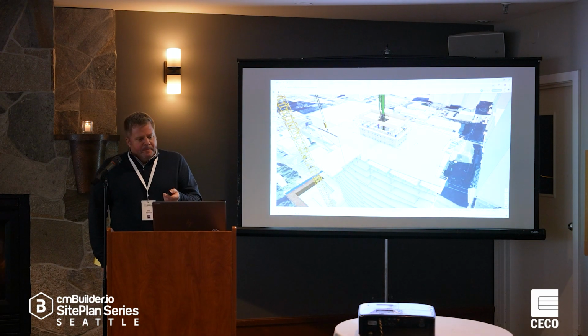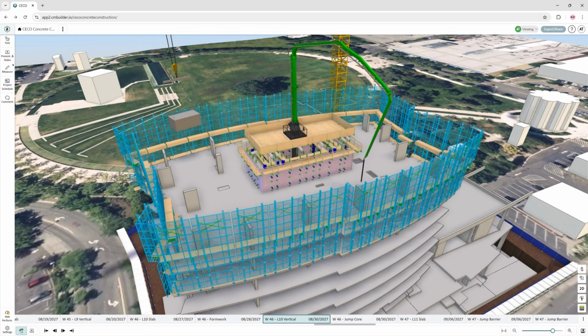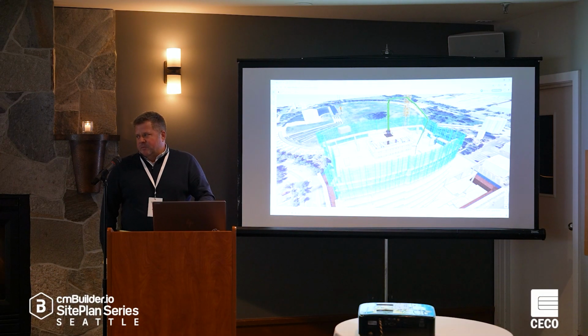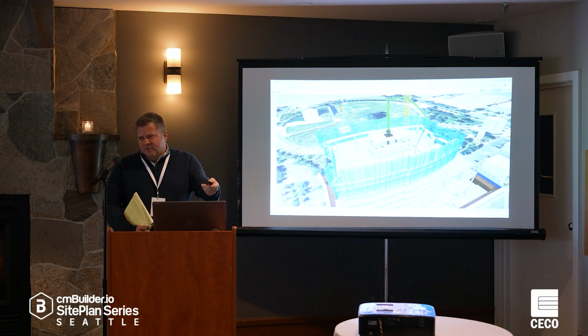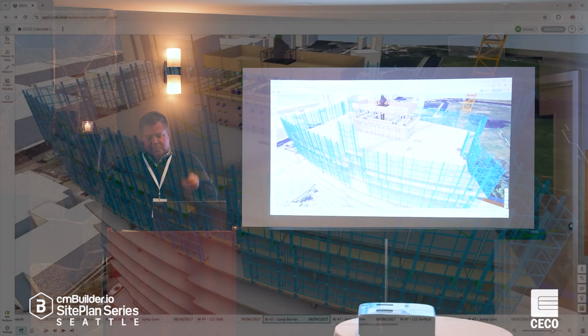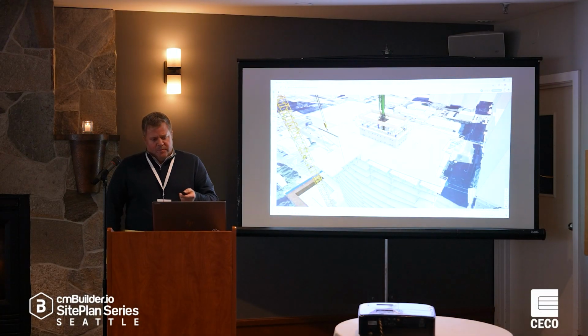On this particular job, we were trying to decide whether to use the fly table straight out, like in the last picture, or one of these enclosure type systems. This system's much more expensive. The client and the owner have to pay a premium for it. Using this software to explain it is worth 1,000 words compared to a site plan. It also goes straight up, so we could show you're not having an impact on Bellevue Way. That's where we were using the visual with our client. Trying to say that in an email is much harder.